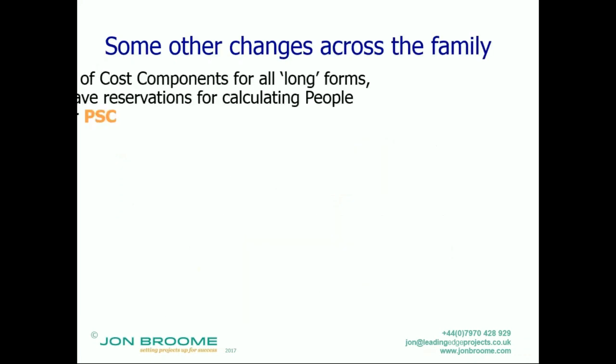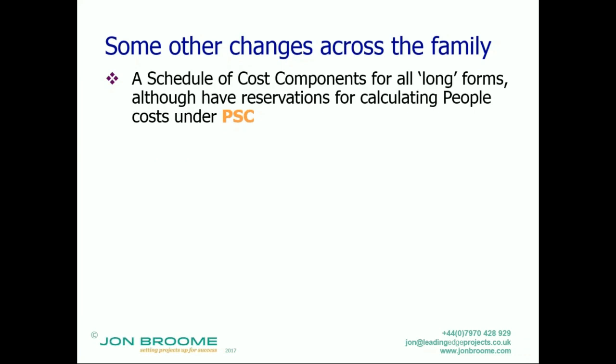So very briefly, some other changes across the family. There is now a schedule of cost components for all the long forms. That's good. I have a few reservations on calculating people under the professional services contract. That basically relates to previously the consultants would say, here's my rate. Now you calculate it from first principles, and how consultants will view that might be problematic.